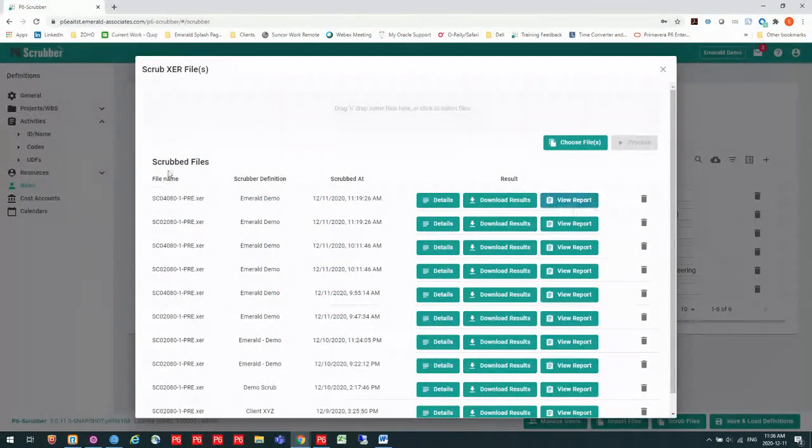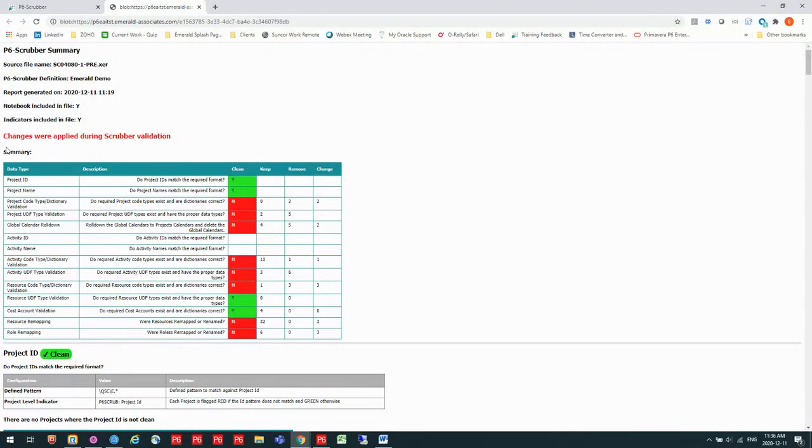But what I would find up on my report is a little box that says how many POBs or risk types were scrubbed out of this, which, especially with those risk types, can be tens of thousands of risk types. And once they've been scrubbed out, it may shrink your XER down to a very manageable size. That's what we see a lot, why XERs become very huge: because of those risk types.